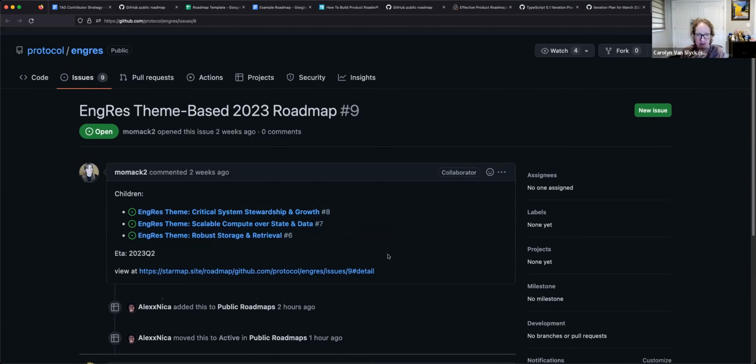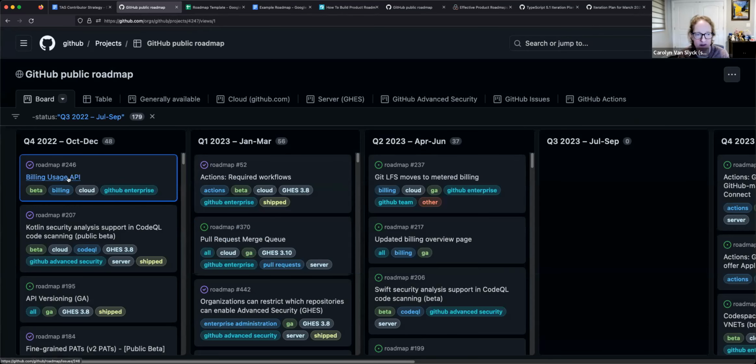Yeah, exactly. So you could do this inside of the description for these roadmap issues to kind of mimic an epic. Is that what you're suggesting? Okay. Yeah, you could also, instead of a markdown file, which you would have to update as things change, just do all of that in an open GitHub issue with the description field and all of your roadmap goals posted there. And then as you get things done, it will just automatically update and save you a lot of manual work.